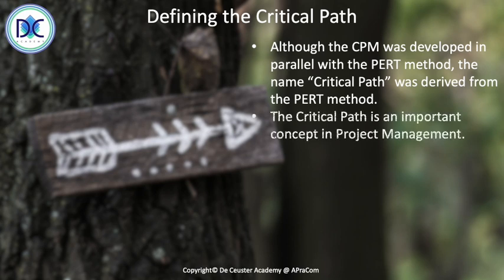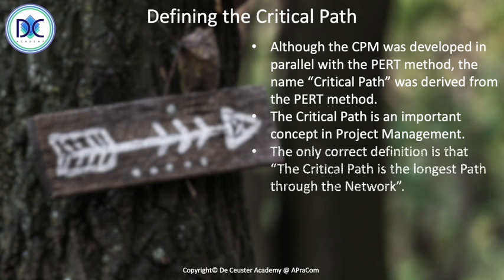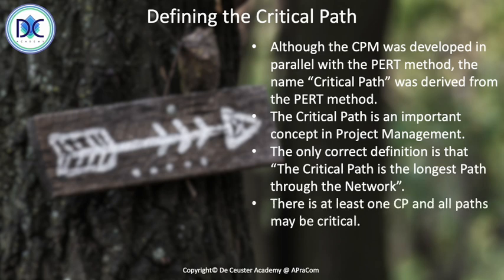Now, the critical path is an important concept in project management, and the only definition of the critical path is that the critical path is the longest path through the network. There is at least one critical path, and in the most extreme case, all paths may be critical.